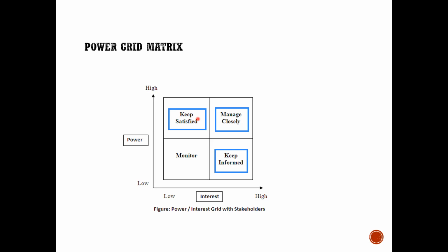So then they came to me. They said, why did you write an email, Pankaj, that requirements are a catastrophic risk? So I said, what I meant to state was that requirements for this project are highly complex, so we should give as much support as possible to Indranil and Anil. The moment I said this, the CTO, Colin Desa, said, yes, Pankaj is right. We should start daily reviews of the requirement progress and help these guys as much as possible.